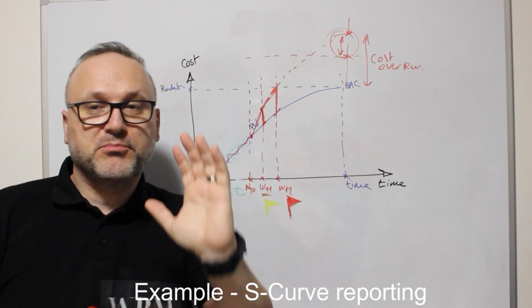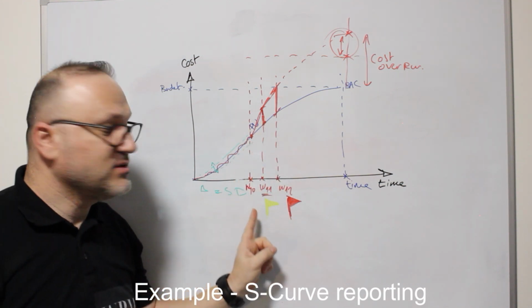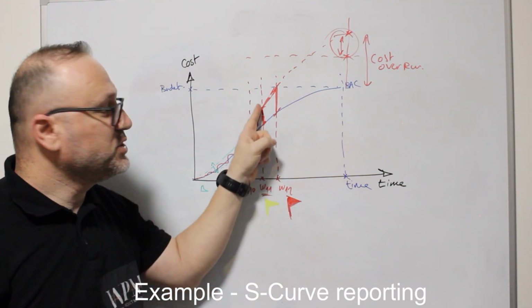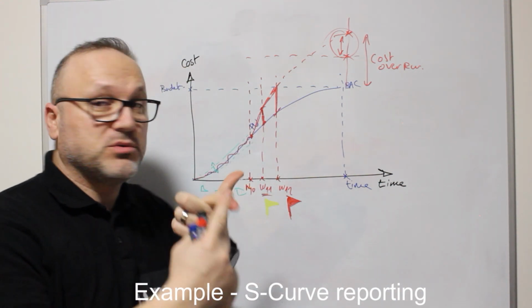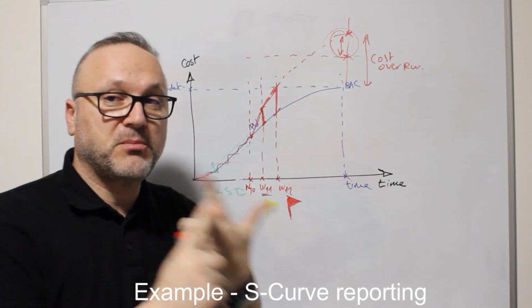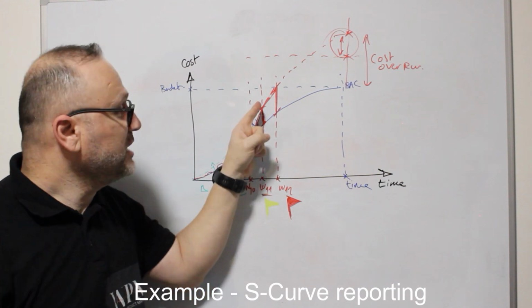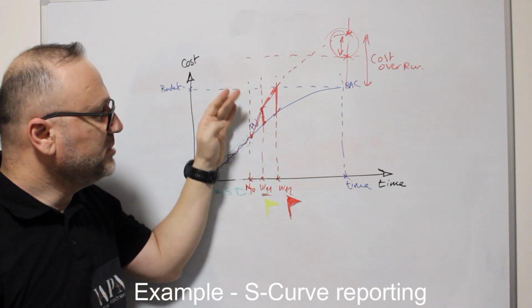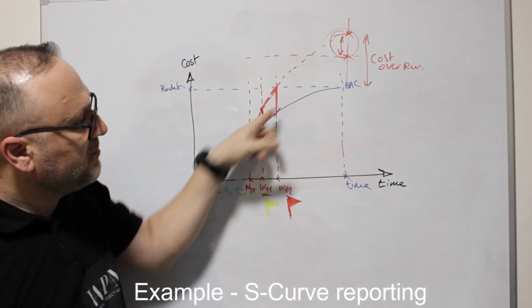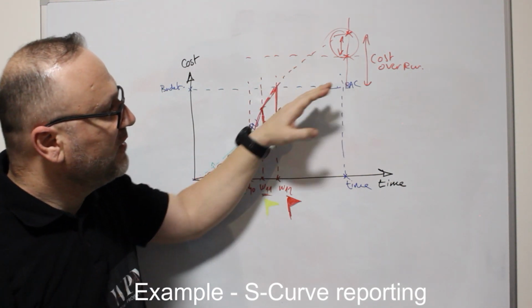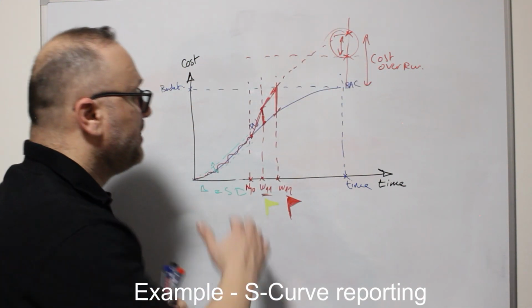And the correct project control should always say here, take care, we have this risk, we have this actual cost. It happened due to lack of planning, due to problems with the client, due to problems with payment, due to some other things. But we need to have the corrective action, which needs to return the actual back to the plan, to make sure that we are finishing with accepted deviation and not with big deviation.